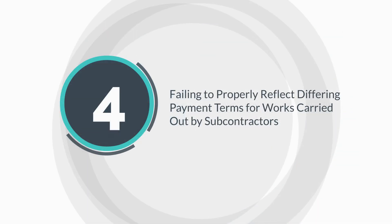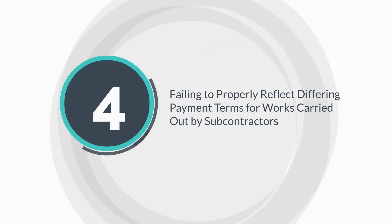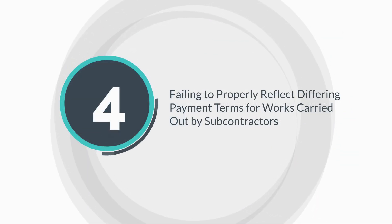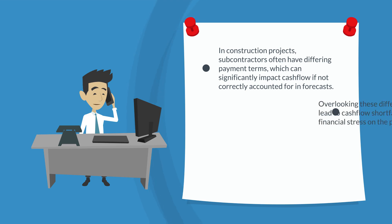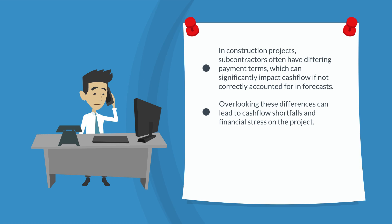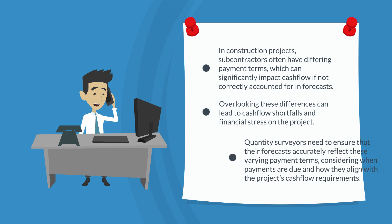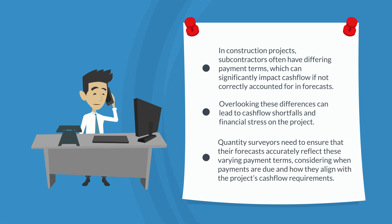Mistake four: failing to properly reflect differing payment terms for work carried out by subcontractors. In construction projects, subcontractors often have differing payment terms, which can significantly impact cash flow if not correctly accounted for in the forecast. Overlooking these differences can lead to cash flow shortfalls and financial stress on the project. Quantity surveyors need to ensure their forecasts accurately reflect these varying payment terms, considering when payments are due and how they align with the project's cash flow requirements.